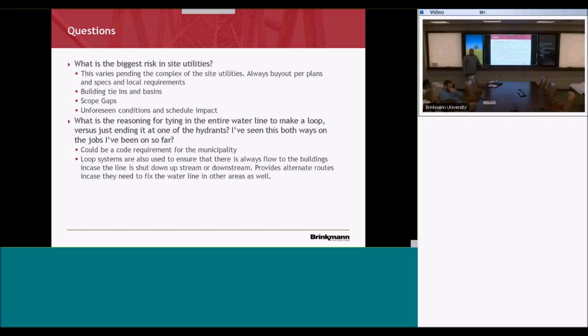What that forced us to do, though, is that the sprinkler fitters claimed the work instead of the plumbers. So we paid $20-25 more per hour for the guys to install it inside. The lesson there is to understand who's going to be installing that, because the plumbers are usually cheaper, but sometimes, if you don't have to have an electrician do something, then maybe the sprinkler fitter is cheaper.